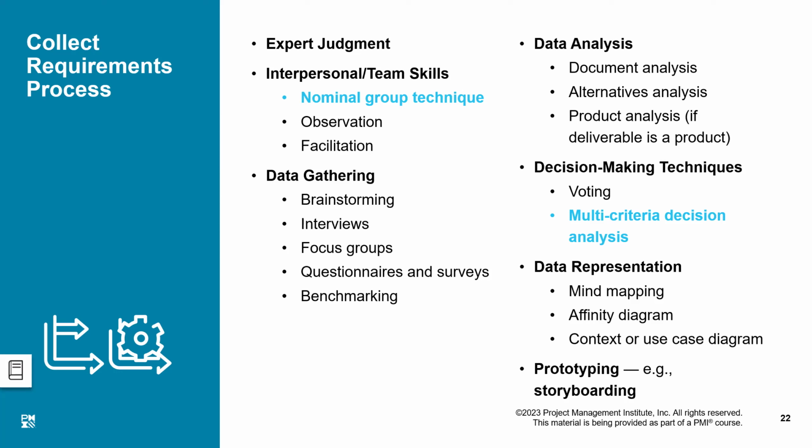So based on the product analysis or product scope, we will develop a project scope, and for the project scope we need to do the alternative analysis. What are the different ways available to me to do this kind of specifications and this kind of product scope?